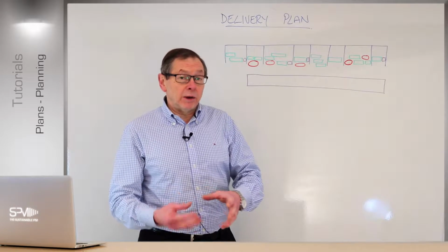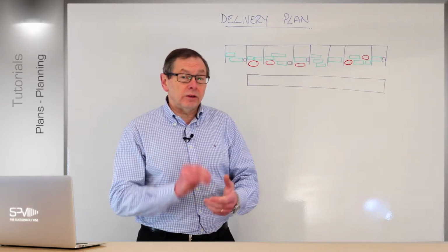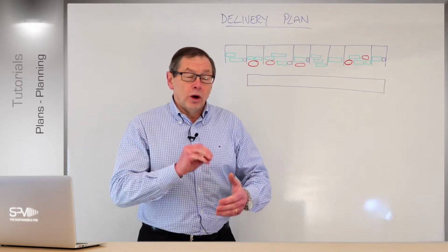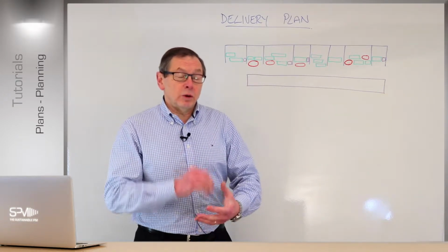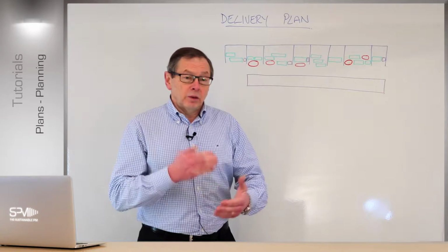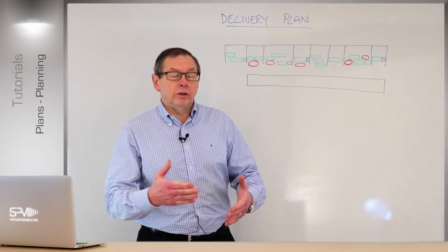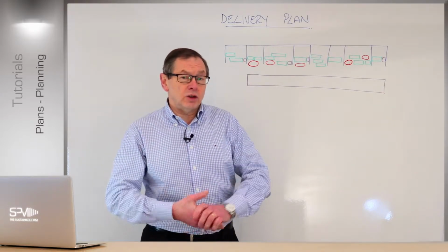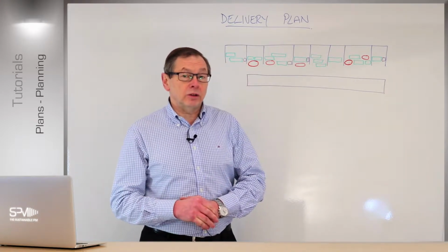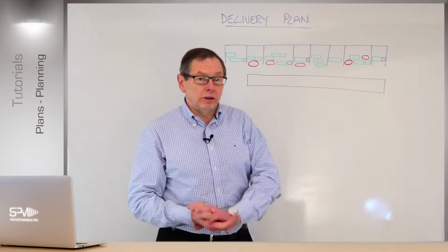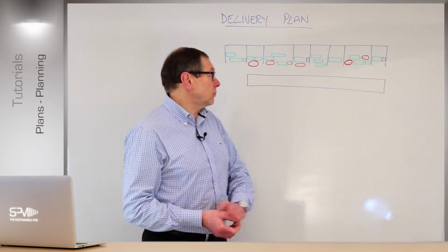Remember, by baselining, we mean an agreed state at this point in time, and from here onwards it's basically going to change control, but it's an agreed state we can start the project off with. So we've got something to monitor from here onwards, where we started, and as things change, we can look back over and compare against the original baseline. We'll look at baselines in another session in more detail.